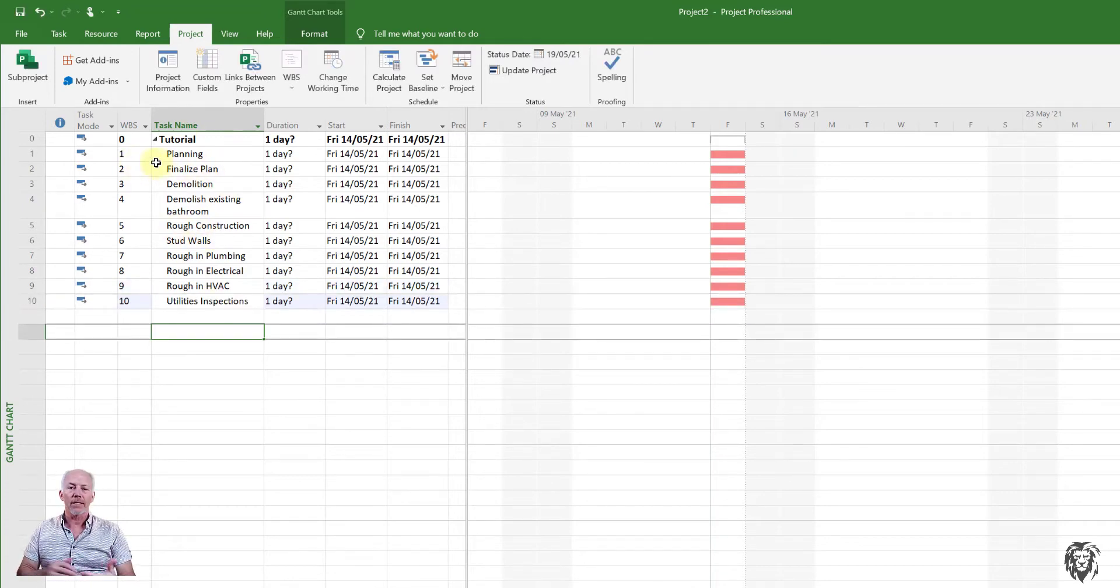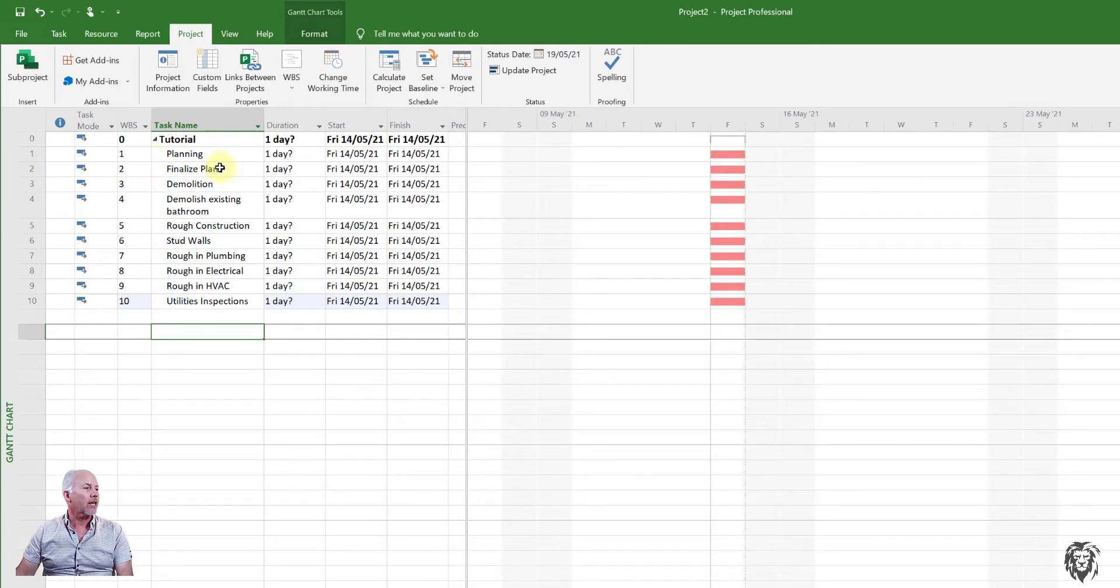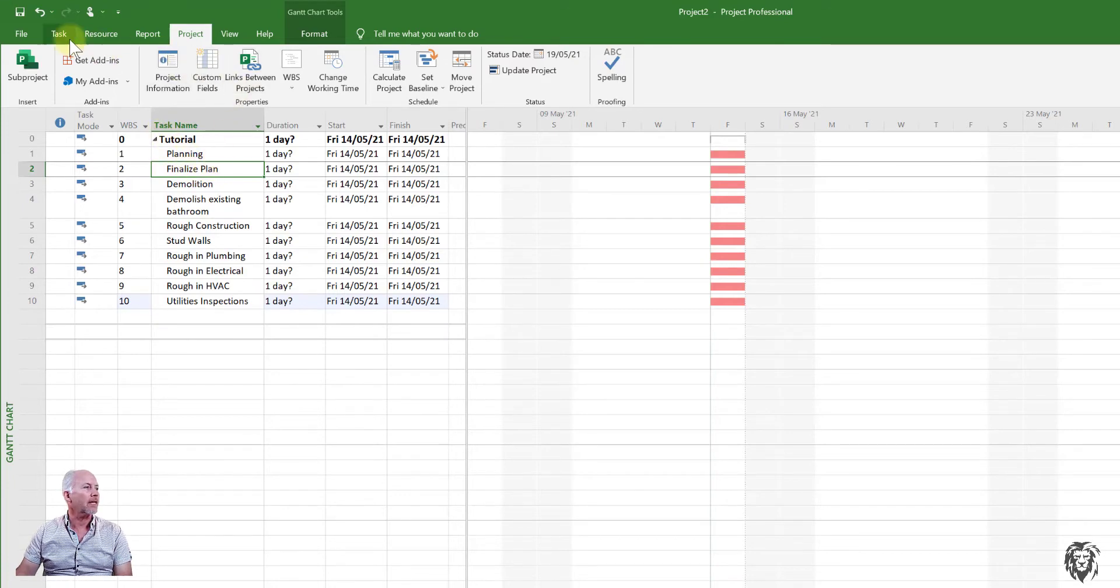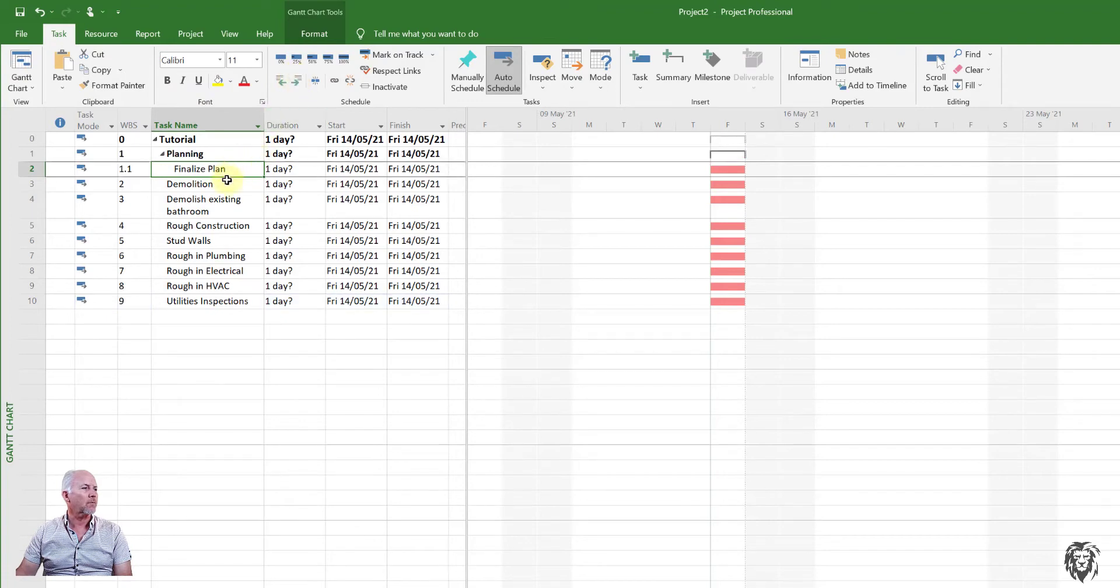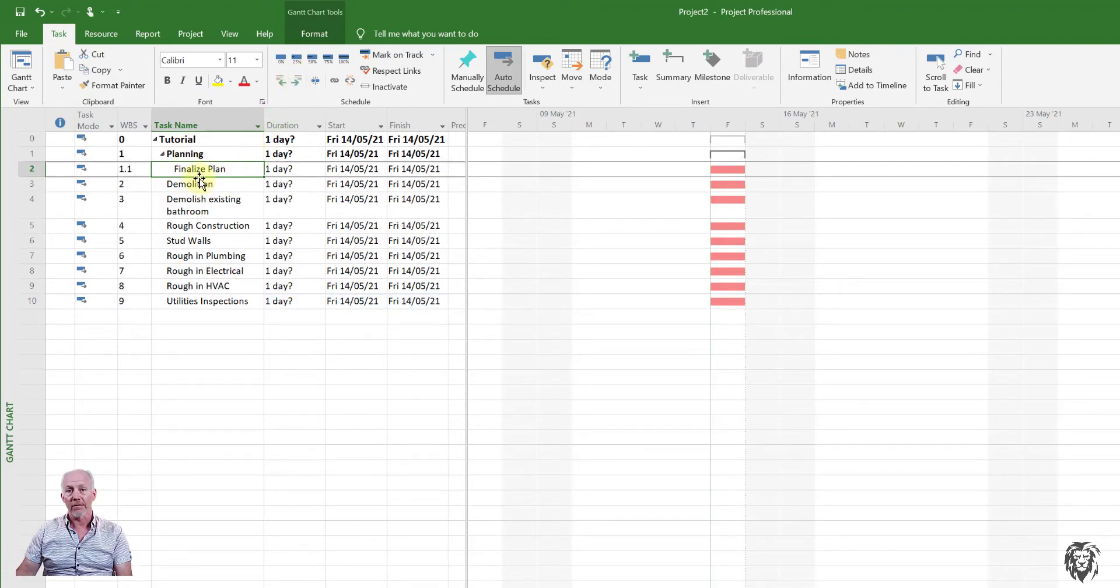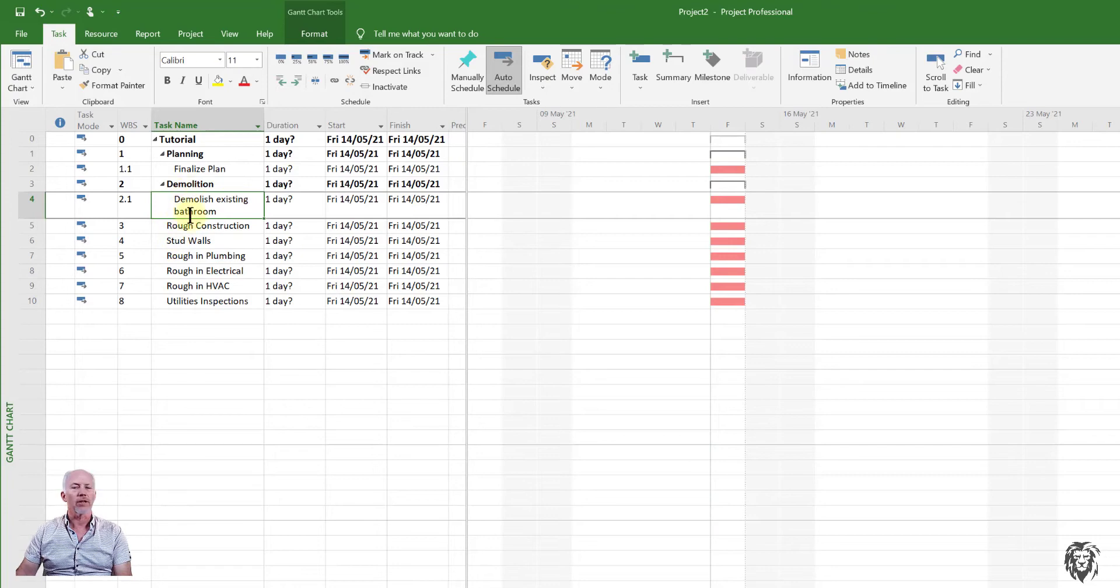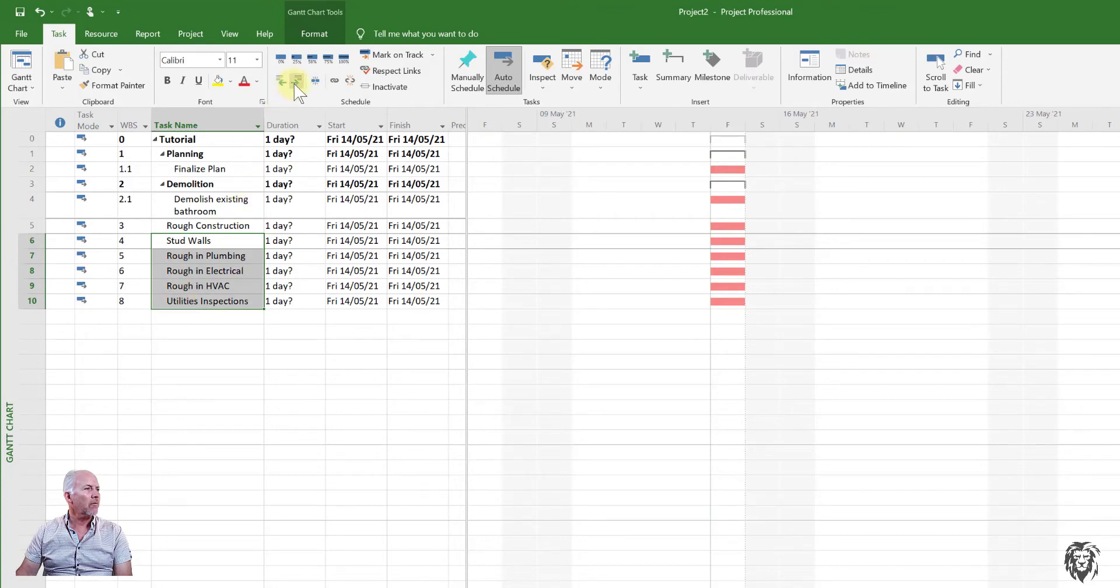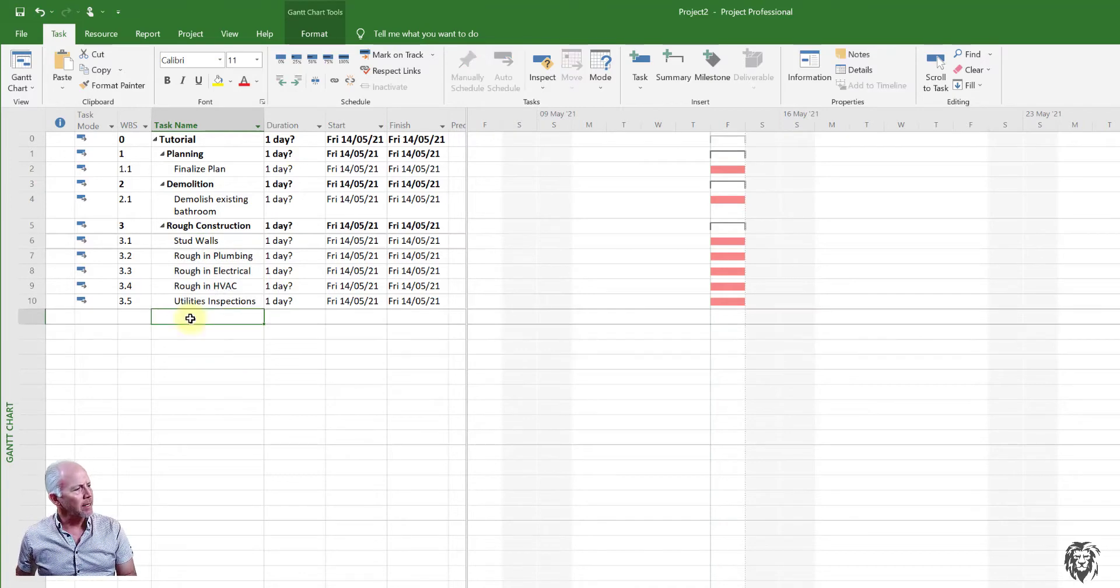Now, while I plan to do this and outline them, so I have some of those summary tasks, I haven't actually incorporated that. So for example, under planning, finalize plan is a single task. If I go back to tasks, I can choose to indent finalize plan, which means that it belongs to the planning group, if you will. And then for the demolition, same thing. We're going to indent it. It belongs to demolition. So you could have a multitude of tasks here. And where we really see that come through is under rough construction. When I indent it, they're all going to belong to rough construction.